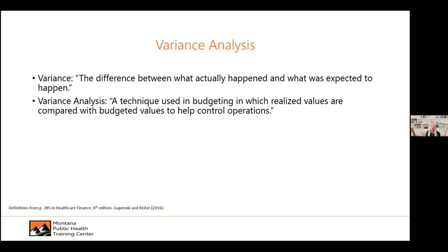But knowledge of the variances is essential to the overall management and well-being of the program and the grant that you're managing. It might be necessary to revise plans, to tighten those controllable costs that you might have to do to offset the unfavorable cost variances where you don't have control, right? Again, if the market is driving up some of our costs, do we have to cut in other places because of that? But we don't really know what's going on unless we're keeping track, okay?